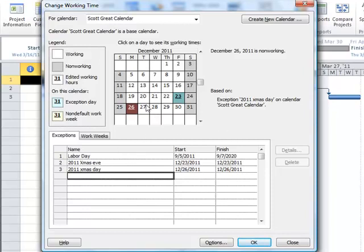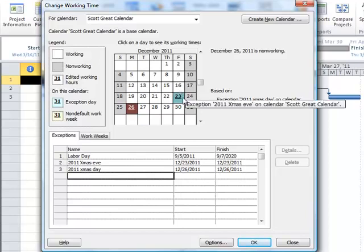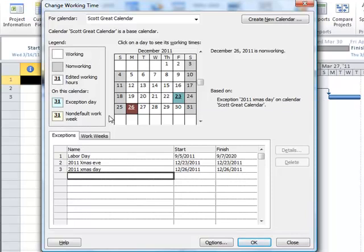Okay, so for those holidays that are related to a particular calendar date, July 4th, Christmas, the 24th and 25th of December, we're going to have to make some sort of exception so that our employees will actually get those days off. But more importantly, so Microsoft Project can correctly calculate the working time and knows that there is not going to get as much work done during these two weeks as we normally would during any other given two weeks.